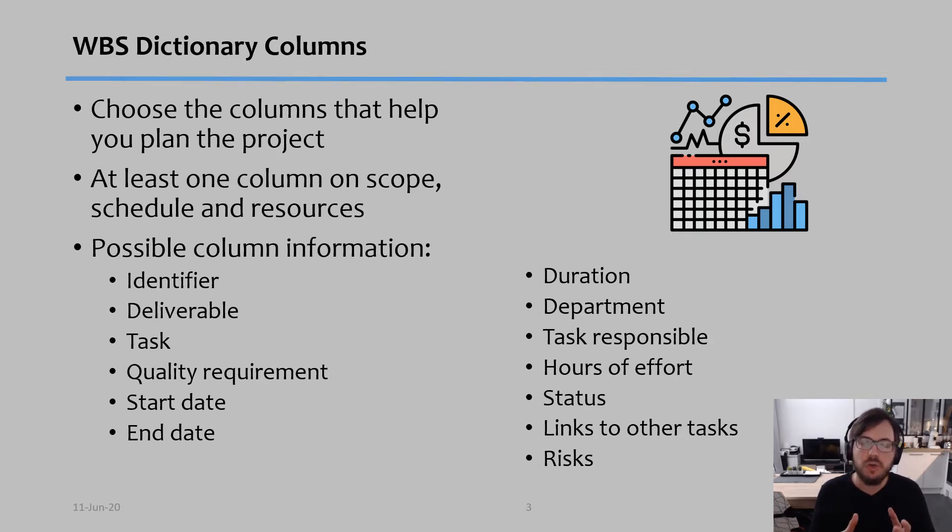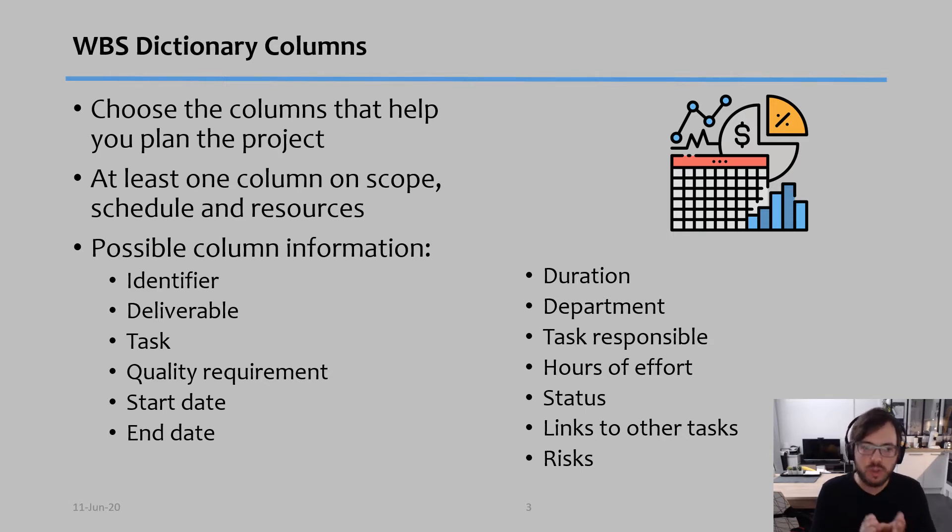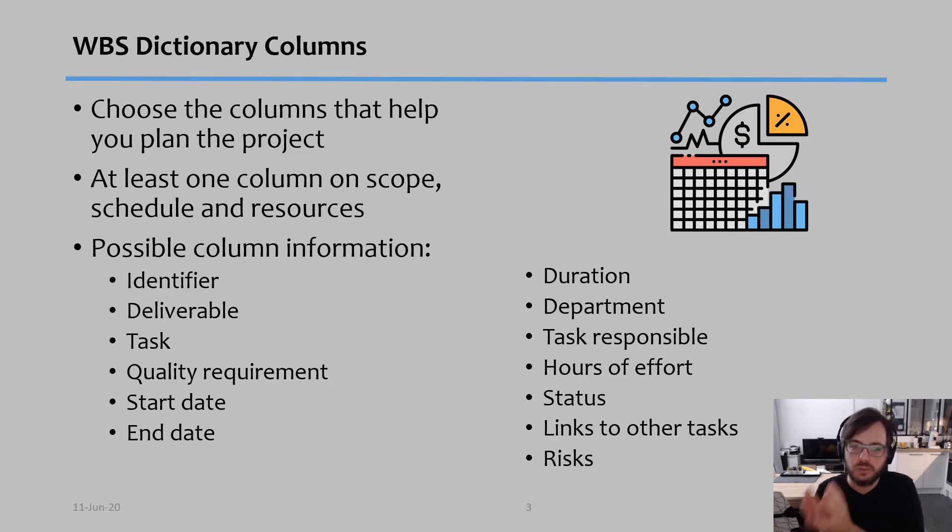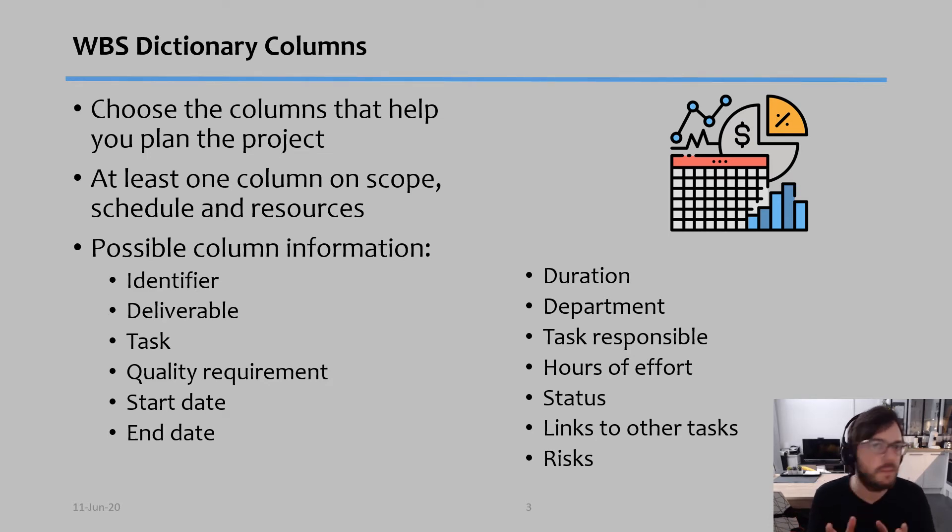And you should have at least one column that describes scope, one column that describes schedule, and one column that describes the resources. And there's many possible columns.